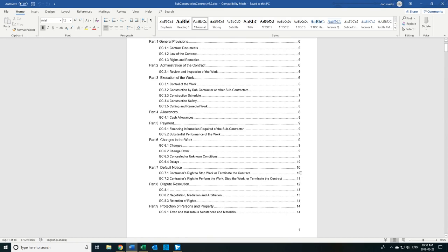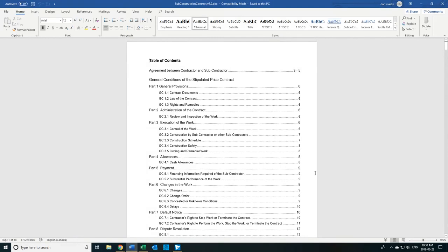For example, in Canada, contracts must contain 12 essentials. These documents include the 12 essentials. The essentials, for example, are payment clauses, or how you price extras or change orders, or how you keep with schedule, what do you do in case the schedule is behind, and so on and so on. And as I said, the 12 essentials that are required to make the document legal are included in these documents. All right, I close this.